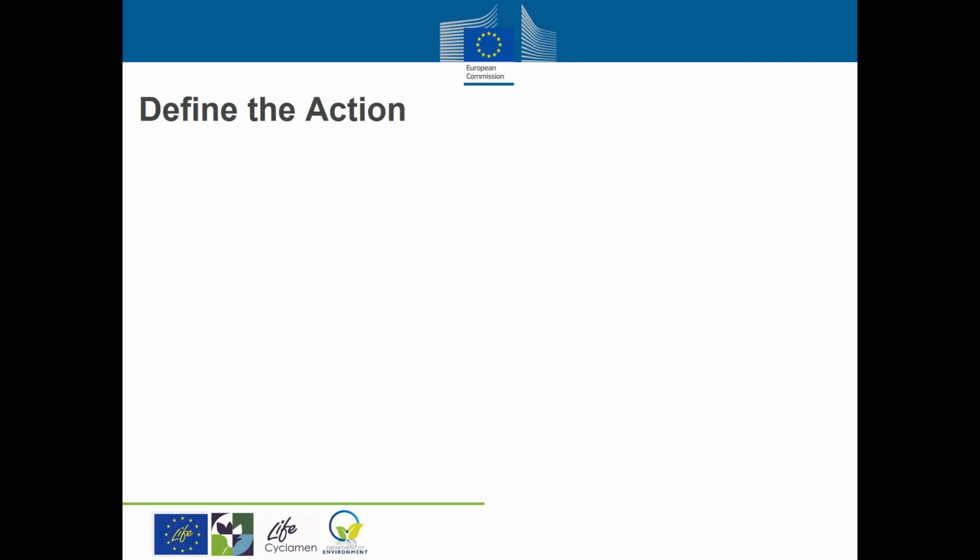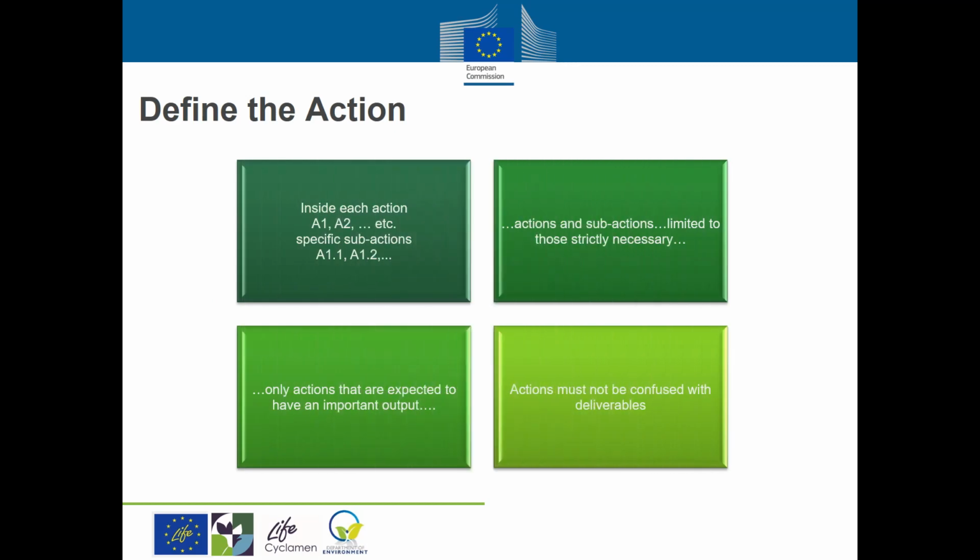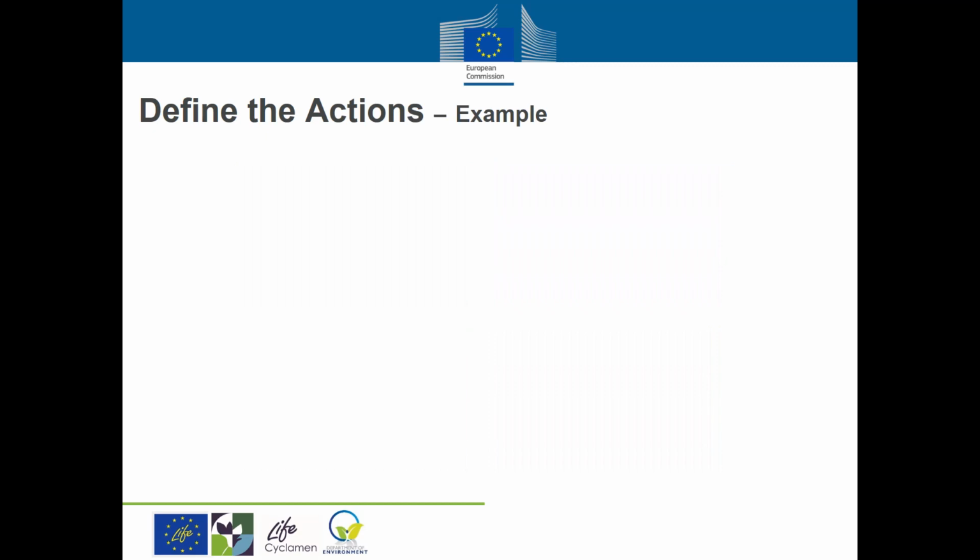Inside each action, specific sub-actions may be included. The number of actions and sub-actions should be limited to those strictly necessary to clarify the logical flow of the project. It is recommended that only actions that are expected to have an important output for the project, for example, design of the pilot, construction of the pilot, etc., are presented as a separate action. Actions must not be confused with deliverables.